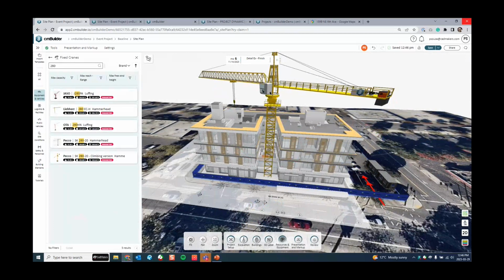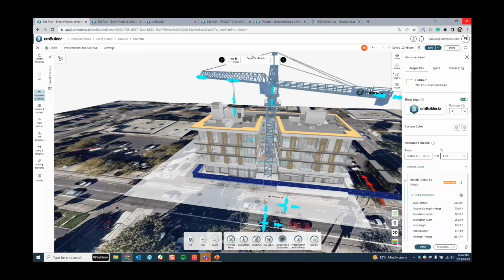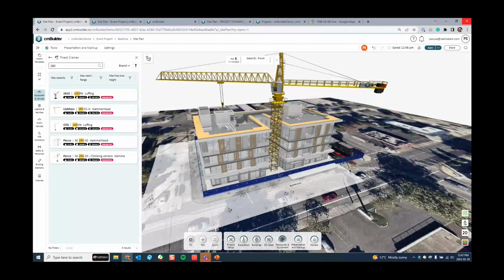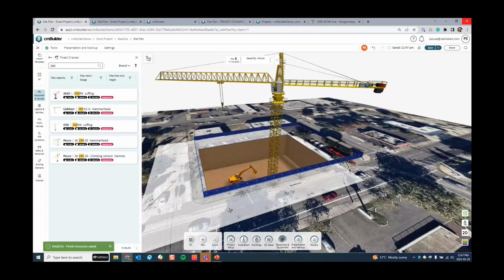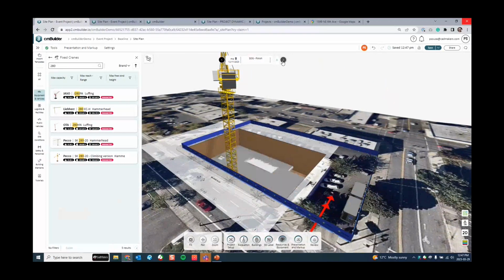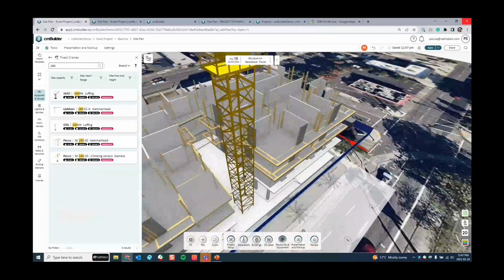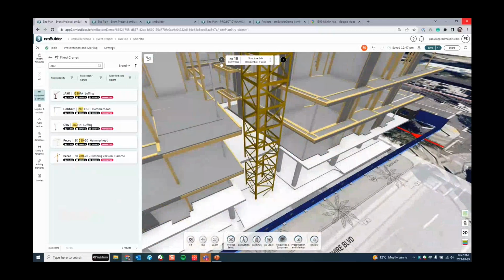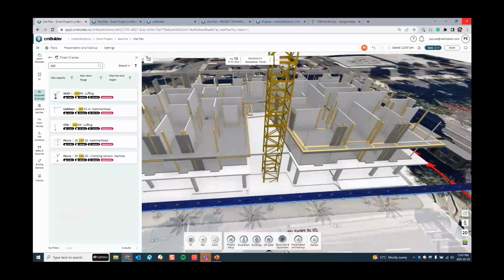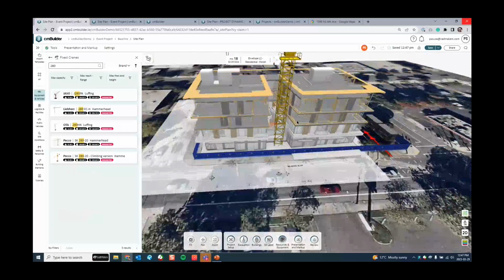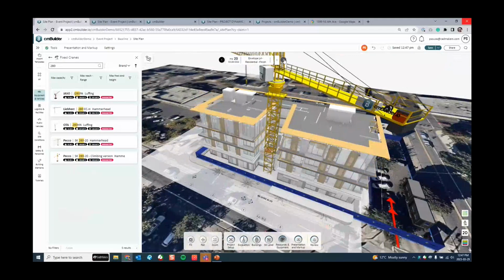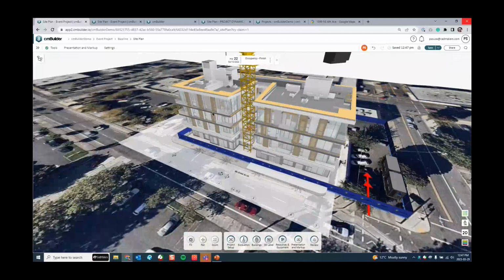Yeah, so now that I put in this crane over here, I put it at the detail finish, detail excavation stage, right? So this crane will show up from that milestone onwards by default. And then I can quickly check my view over here and how that would interact with the rest of my sequence. Okay. Can see right away that there is a little clash over here, so probably I would move the screen outside to clear this structure. Is that good? That's great. Yeah. So you get the idea.